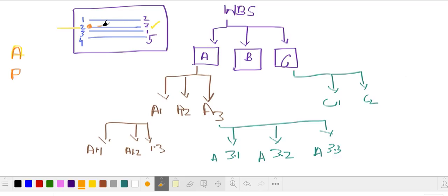He's going to look for the historical information. So this is basically historical information plus your own expert judgment. The developer is going to use his own judgment and the historical information. This is what we call analogous.